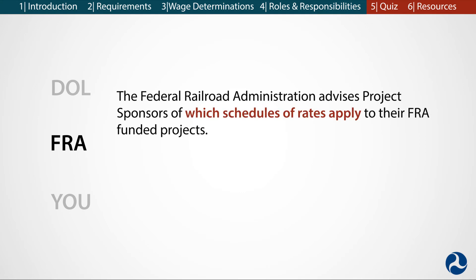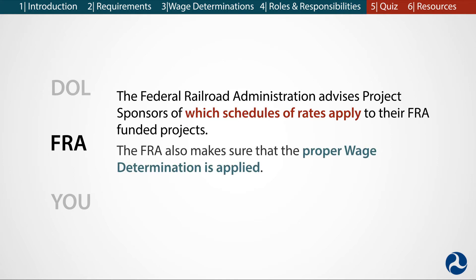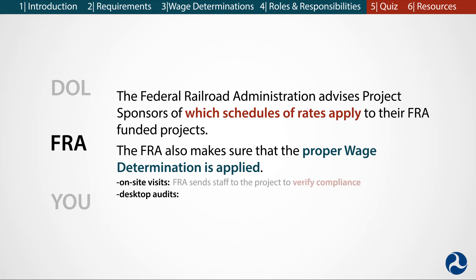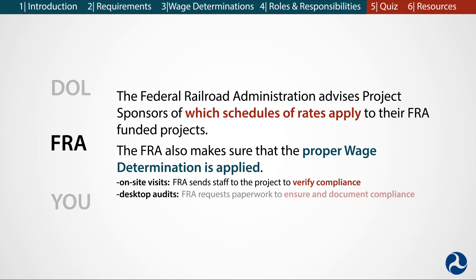As the grant or loan-making agency, FRA advises project sponsors of which schedules of rates apply to their FRA-funded projects. FRA also performs oversight to make sure the proper wage determination is applied. To do so, FRA conducts on-site visits and desktop audits. For on-site visits or routine audits, FRA sends its staff to the project to verify compliance with the DBA. For desktop audits or remote audits, FRA requests paperwork from project sponsors to ensure and document DBA compliance.